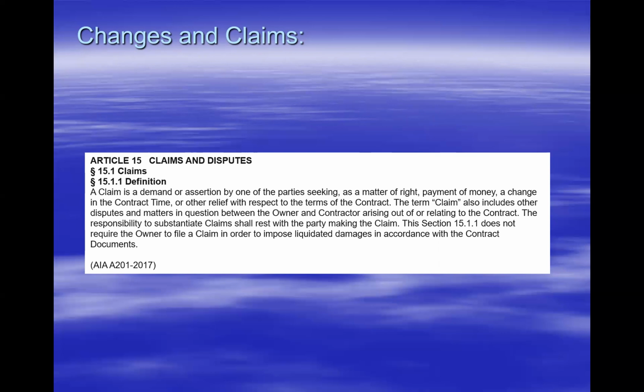So when I dissect that, basically what we are saying here is that I have a right to make a claim based on change of scope that might result in additional monies or additional contract time. Now, I probably ought to just really quickly make a statement here. Sometimes what we do on a project might actually decrease the dollars that it costs us to provide that. So it could actually work both ways in that regard.